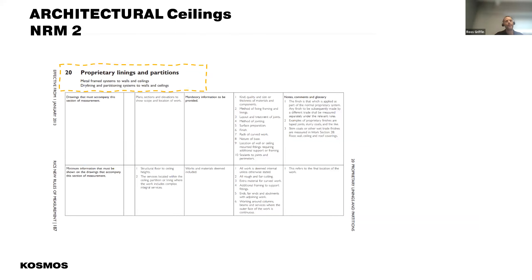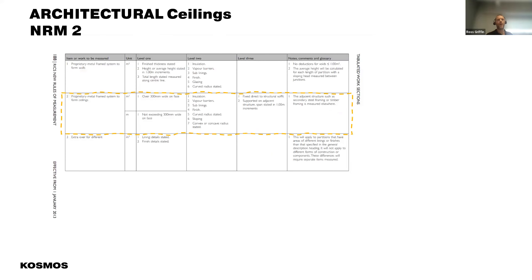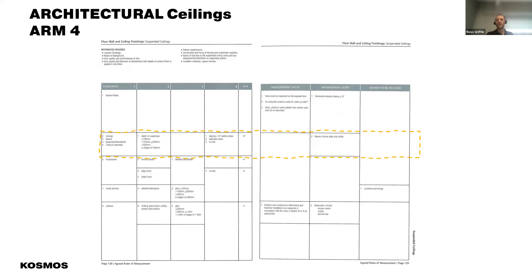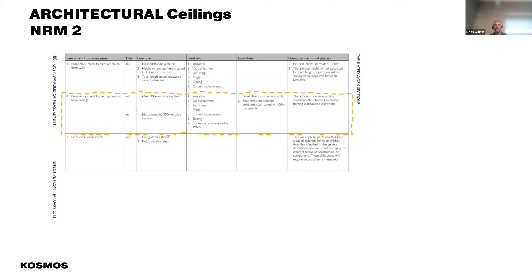Taking ceilings as an example using NRM2 — partitions and ceilings, metal frame etc. The requirements around measurement: if it's over 300mm it's square metre, if under it's per metre. Certain elements at level two need to be identified — insulation, vapour barrier etc. Some of that comes from the specification; others might be modelled, like whether it's sloped or curved. If you have that conversation with the design team you can extract the big quantities from the models, but the smaller elements not exceeding 300mm — we're not going to get those from the model. You'll have to manually measure or derive them.